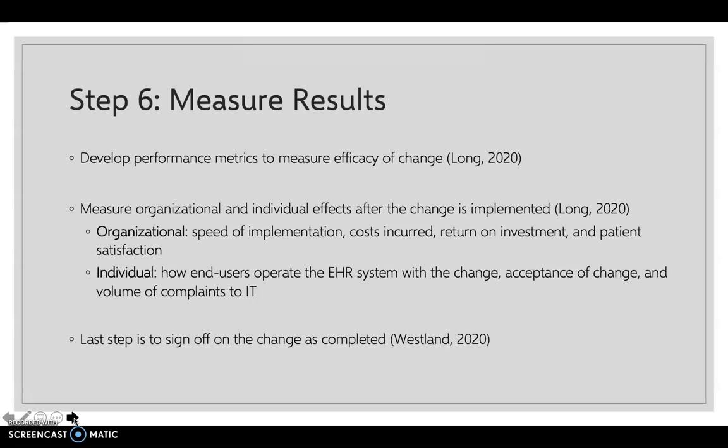A good measure of individual response to change is evident in the volume of complaints to the IT help desk. Since the IT help desk received several calls regarding the system issue in this scenario, it tells us that there was limited proficiency to the nursing documentation change, especially for employees in the respiratory therapy department. As a last step, it's important that IT leadership and CAB members sign off on the change in a change log, where they can confirm that the change has been fully completed. This can be done in a change control meeting so that all deciding parties have the opportunity to approve of the completed change and its measures.